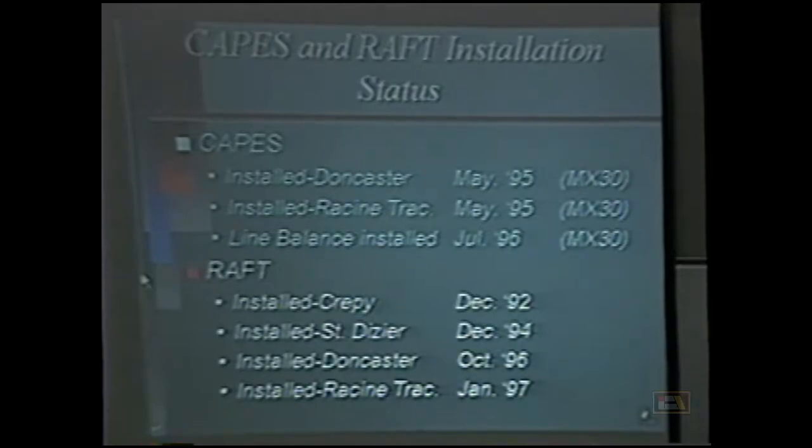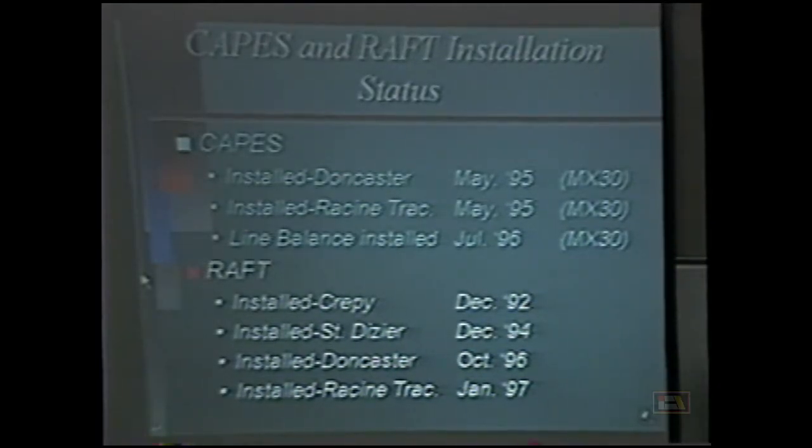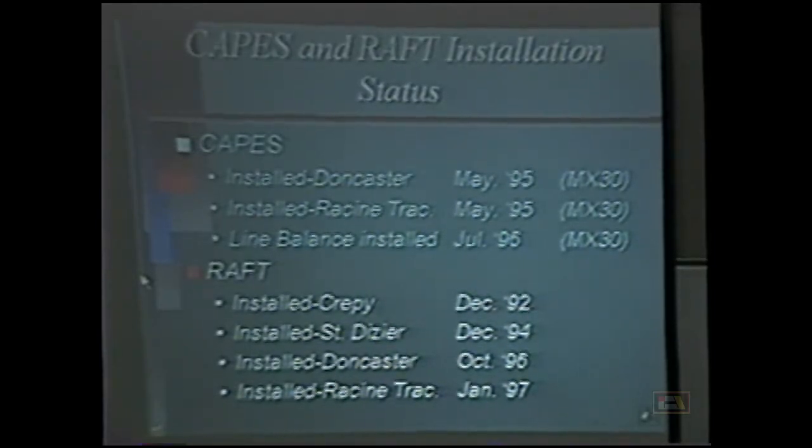First, we need to create a project plan and some timing. Then we talk about the investments and get the car approvals for whatever hardware or software you might need. We get that installed if it's required. Again, you need to talk to your IS people about what server capabilities you have. And then we need to install the software and do some migration of existing data.